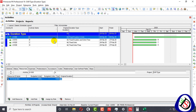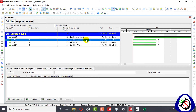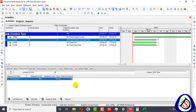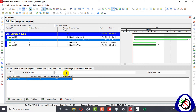I will go to activity B — Fixed Duration and Units Per Time — and add an excavator resource. When I change the duration here, the budgeted units will change. If I put 7 days, it goes to 70. When I change the original duration, budgeted units per time remains the same because it is also fixed. For example, if my budgeted units per time is 100 cubic meters per day, that rate stays constant.